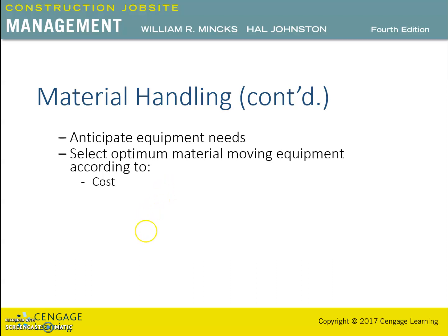So as far as the cost is concerned, the rental cost of the necessary equipment, including minimum rental, 4 hours, 8 hours or so, and travel time to and from the job site should be considered. The availability of the material moving equipment should also be considered. The availability of the lifting equipment within the community.